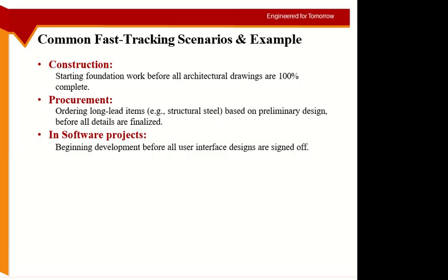And the good thing is, most construction items do not expire. So steel, for example, you ordered it, or cement. Cement is sensitive, but steel or aggregate or some admixture or paint, they do not expire very quickly.